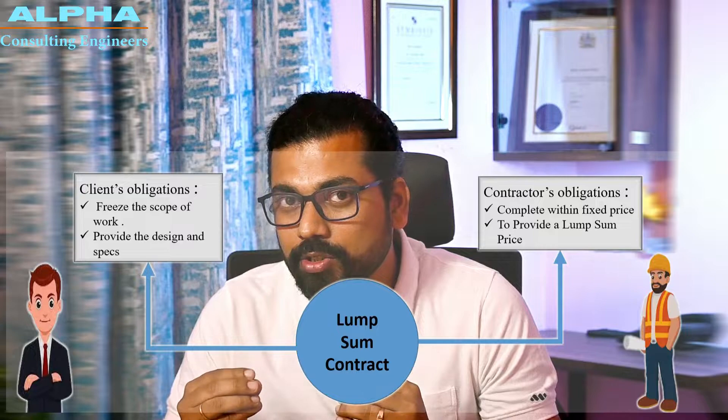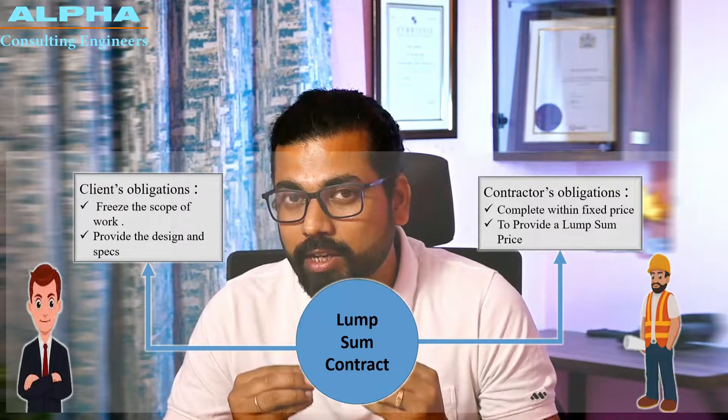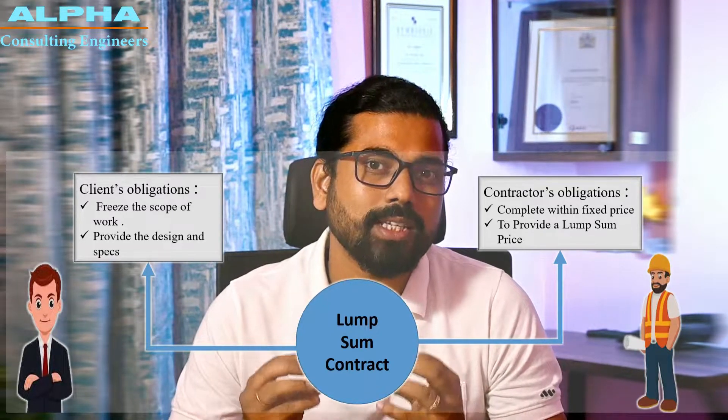The contractor must ensure that the price will not vary during execution of the project. The only situations where price can change are if there is a change in scope, a change in items, or a design change from the client's end. The risk in a lump sum contract is shifted towards the contractor, who provides a lump sum price against design, scope, and BOQ that will not be changed during the execution stage.